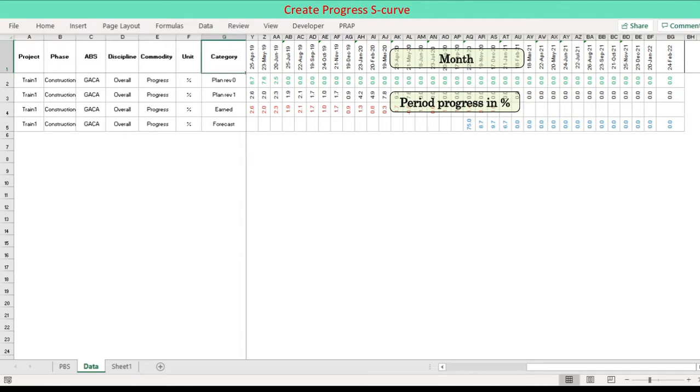By now, it is assumed that progress data is organized in tabular form: Plan, Actual. Maximum 5 rows of data to avoid congestion of the progress curve. Period is on a monthly basis. Data is period data, not cumulative.